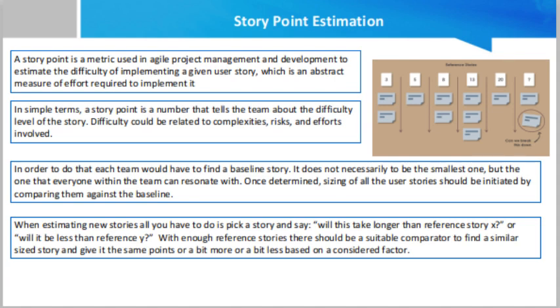In addition, it is important to note that when the single story point assessment is greater than 21, the user story needs to be split again, and a single user story point of no more than 8 is the most rational state.